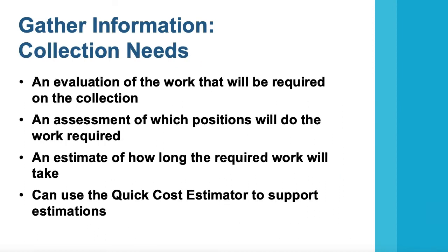In addition to organizational data, you will also need data specific to the collection you're addressing, including an evaluation of the work that will be required on the collection, an assessment of which positions will do the required work, and an estimate of how long that work will take. If you need help thinking through how long the required work on the collection might take, you can use our Quick Cost Estimator tool to get a general estimate.